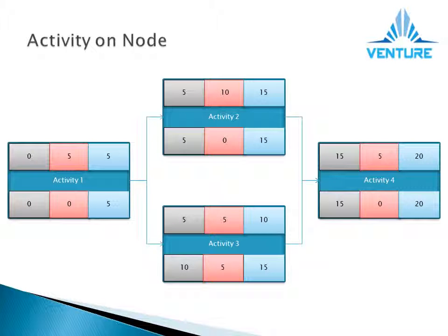Nodes can be linked together to create a time management diagram. This can be done once the nodes are listed in order, highlighting which activities can run together and which activities rely on others first before being completed. So in the current example, activities 2 and 3 can run simultaneously at the same time. However, the diagram also shows that these activities cannot begin until activity 1 is finished.